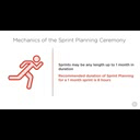As another reminder, a time box is a fixed period of time that we agree upon in which we try to accomplish a task. So in the case of today's sprint planning session, we've agreed that we'll allow ourselves no more than 4 hours to complete planning. If 4 hours elapse and we're not done, then we'll simply move forward with the work that we have and we'll look for ways to improve our efficiency next time.